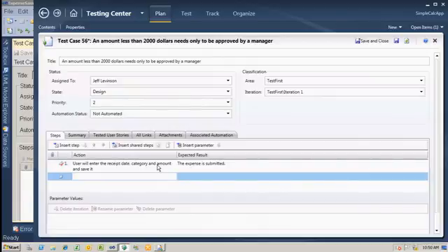In most requirements, you're not going to see that. In most requirements, you're going to say, we need to submit an expense, and the customer keeps thinking of different things that they want to add to that. But there's no way for you to hit a moving target, pretty much ever. In this way, if I can get the customer to agree that if I submit these things and it saves it, then we're good. Customer signs off on it, you write code that actually does this, and you're done. No gold plating, no extra things. I'm not talking about buttons or forms or anything else, technologies, web forms, Win forms, it doesn't matter. I'm talking about functionality, and if my application meets this functionality, I'm good.